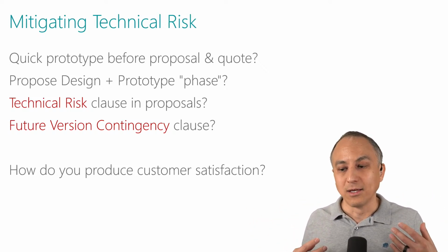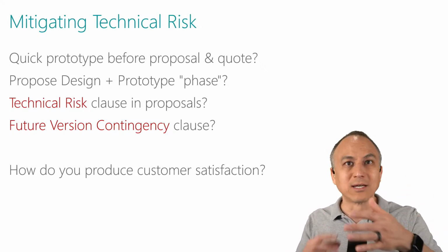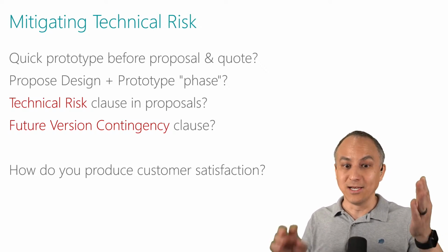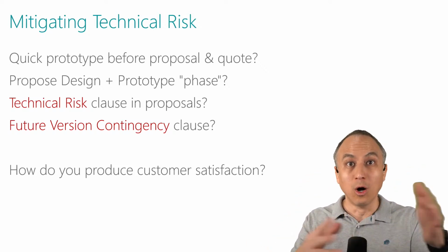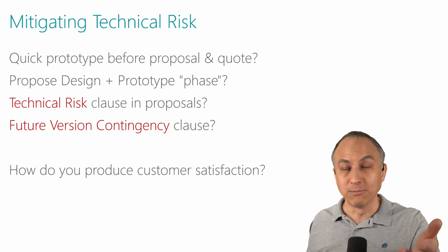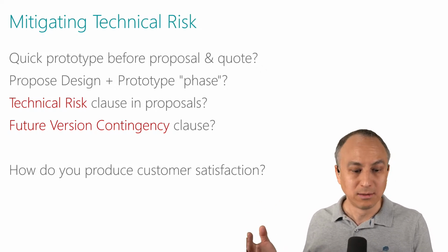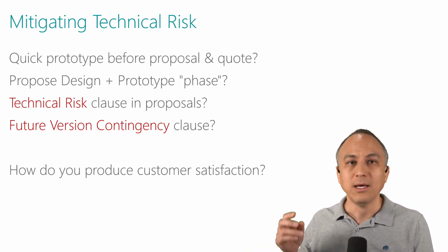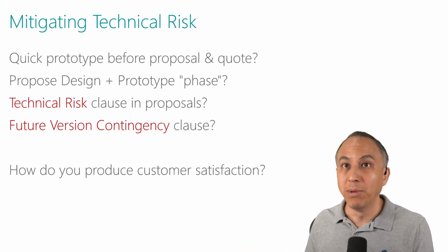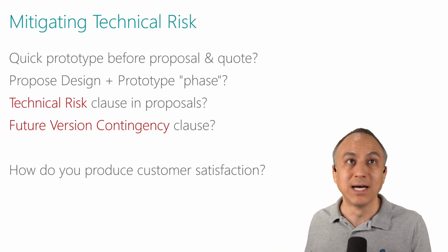So I think you can't eliminate the risk. You just need to say, look, there is risk. Be explicit about it. Don't try to pretend it doesn't exist. And then say, okay, there will be risk. Who owns that risk? How much are we going to share that risk between you and the customer? And sometimes you just have to eat some hours. Sometimes you have to eat those hours, but I would like to kind of manage it and I don't think there's a single answer.